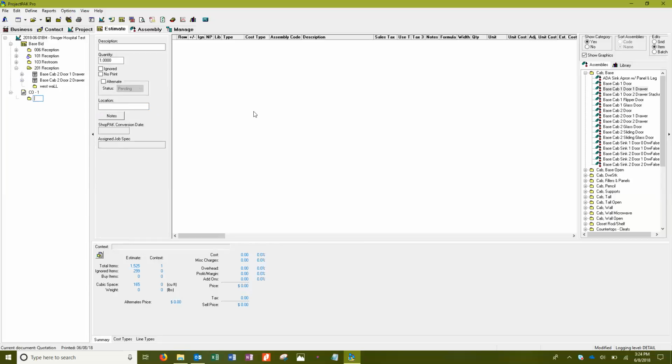Is that the best thing to do, is to just call it the same? Whatever you want, whatever is normal for you. If it's referencing an RFI, sometimes I would put that in there so that it was very descriptive to the customer. If it's a deduct, I might put change order 1 deduct. If it's a deduct of room 105, I might just do CO1 deduct room number 105, and you can put in as much or as little information as you want. It kind of depends on the guy that you're dealing with at that point, right? Yep.